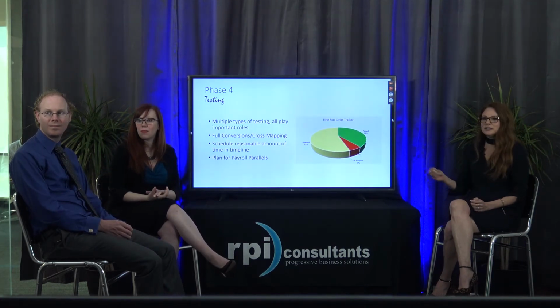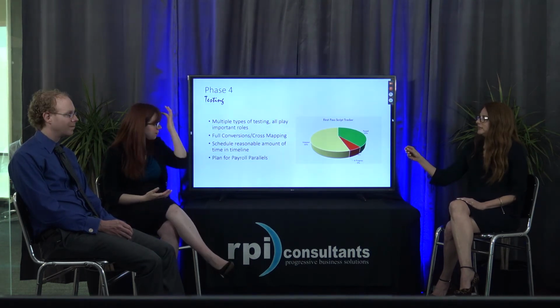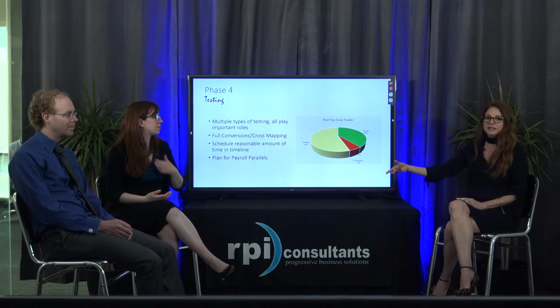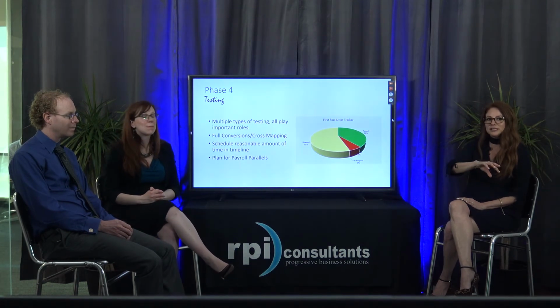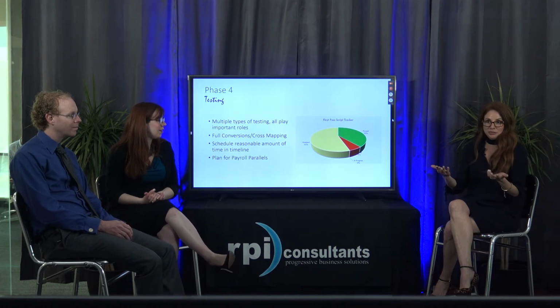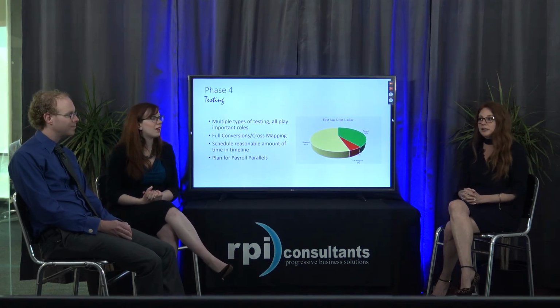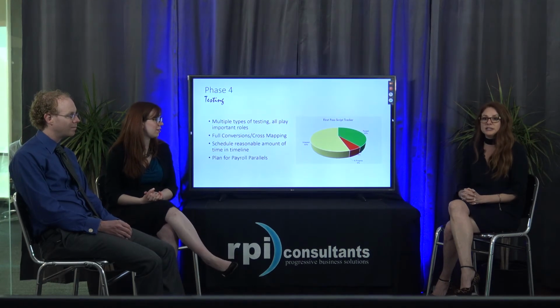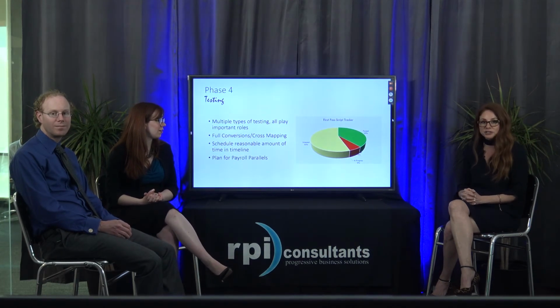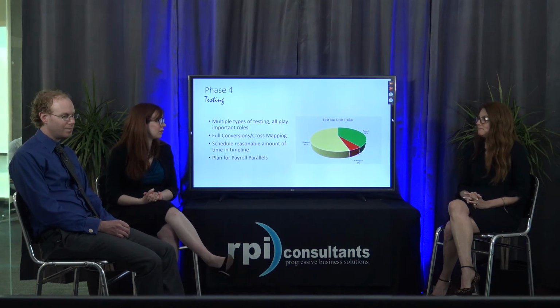And it's scripts we run through in one of these. I was going to say it's iterative testing too. So you find an issue, and then somebody has to go back and fix that issue, and then you have to retest. Exactly. So it's generally going through 300 to 500 test scripts. Every piece of the process, your employee space, your manager space, all of those components going in. If you're doing benefits, a couple hundred there.